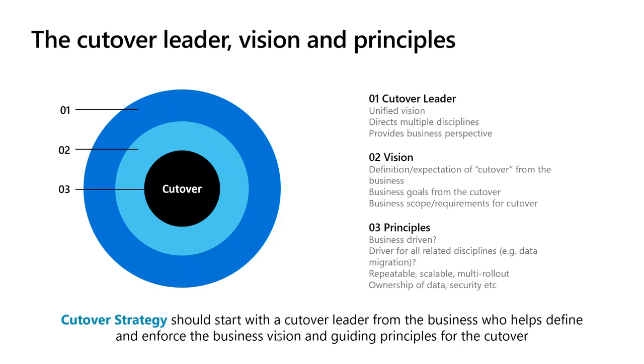And not just for the final cutover, but also for the interim periods, for when you need data for testing, for training, etc. There are multiple parties involved in that as well. And having a cutover leader that you nominate from the business helps you unify that vision, helps you have somebody who is now the liaison with the business as well. Right? And having that single cutover leader then allows you to also provide a business perspective to the cutover and not just a technical data migration perspective.